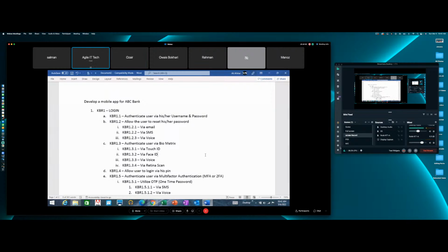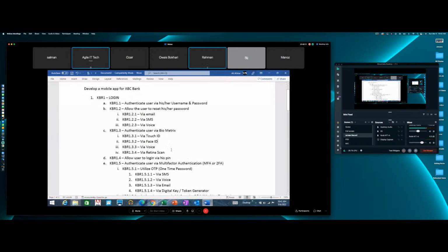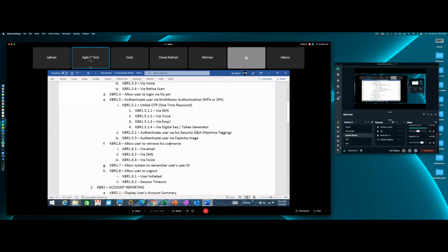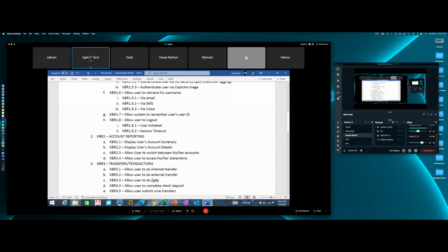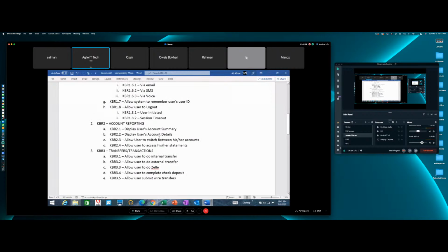Now, this is traditional waterfall, right? So in traditional waterfall, all the requirements will be delivered in one go. Everybody agree? Yes. So do I need to prioritize these requirements if I was delivering this as a traditional waterfall model? Do I need to say this is a high priority item versus a medium versus a low? No, it's all going to go in one shot. Great? Yes, I agree. Okay.